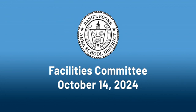The next part we have is the HVAC project update. Yeah, so our goal was to actually start today, no students in the building, and because we had 15 to 17 mile an hour winds, they did try using the crane, and we shut down around 9:30 this morning. We're going to now start the project this Sunday at 7 a.m. So that does put us back a week.